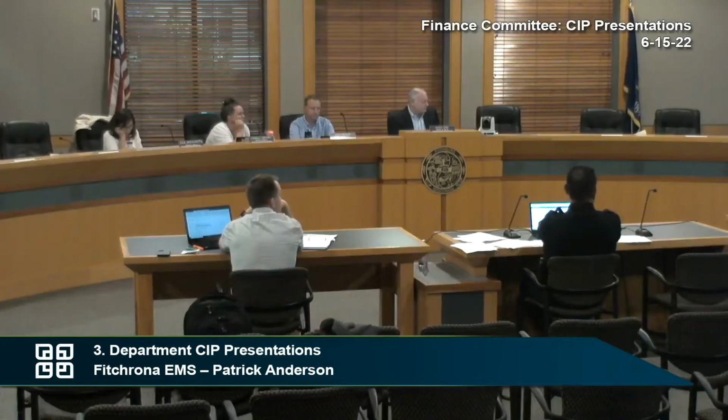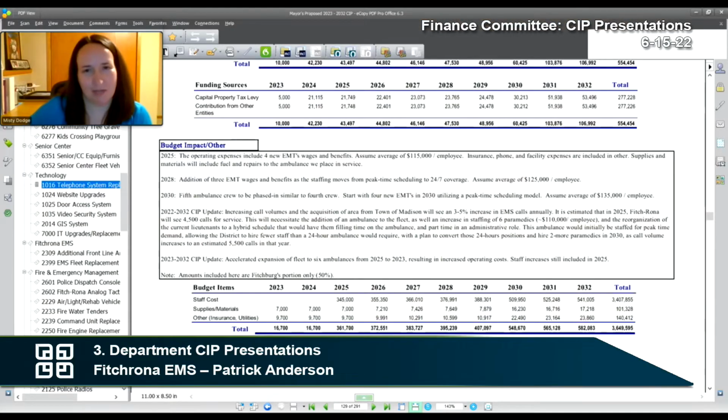Go ahead, Misty. We are seeing that problem too. And I can appreciate that we won't actually pay the cash for it until 2024, for example. But we shouldn't sign a contract for something we don't have the money for now. Otherwise, you're binding future councils to pay for that in 2024 if you didn't budget for it this year. So we are running into that as well.